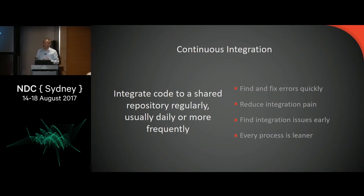From that implementation, I needed to check that there were no bugs, the algorithms were correct, there wasn't going to be any performance issues, and it met our normal standards and criteria. And that would take roughly a day. A week and a half or 2 weeks worth of work could take me a day to review. It's a well-published fact now that the larger a code review is, the lower the quality of the review. So if we can change that cycle and do our commits daily, all of a sudden our reviews are also happening daily.